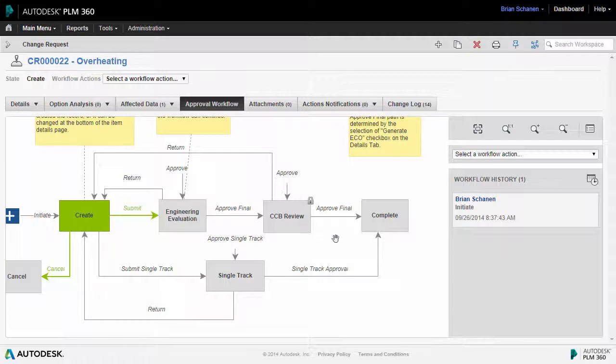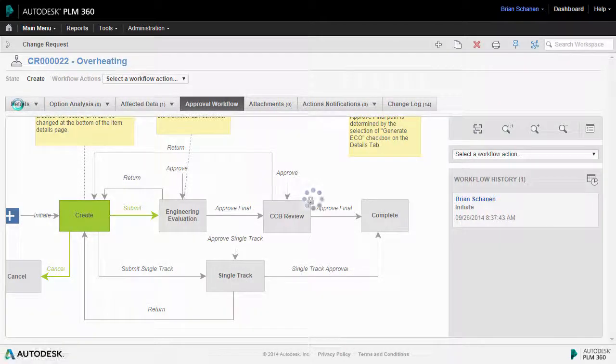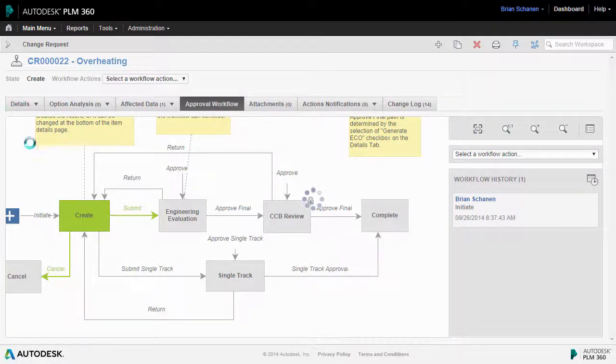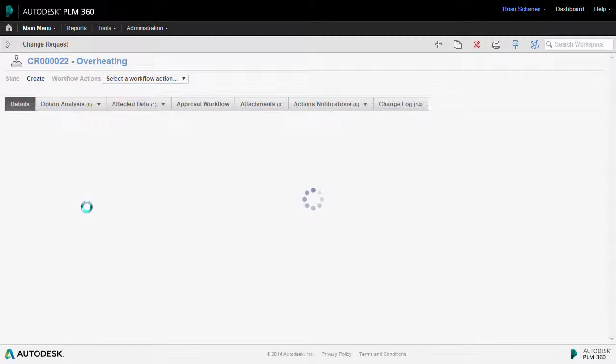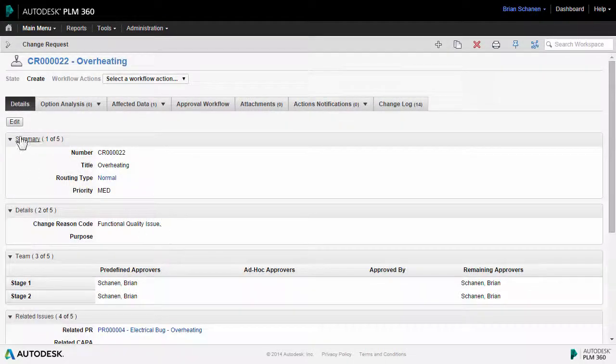Now, the way that this particular change request workspace is wired up is notice that we don't have an option to go to the single track or the fast track. That's because an answer back here on the details tab under the routing type went with normal. Normal will send it through and allow for multiple reviewers.